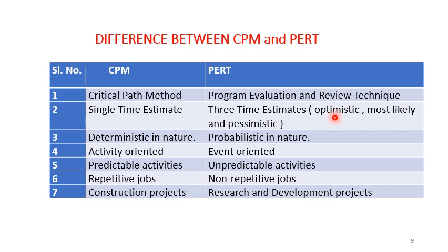that is, the rider is in a very good condition to drive, the vehicle is giving a very good mileage, there are no traffic blockages, the road is not crowded. So we can say the most optimistic measure could be say 20 minutes to reach the destination. Optimistic, the best possible time duration to deliver the product.